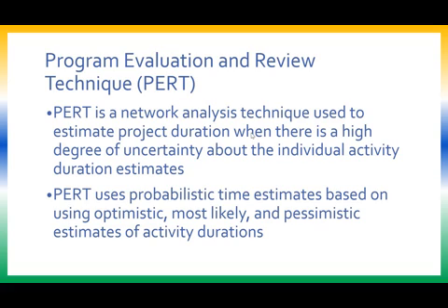See, the major difference between your CPM and PERT is CPM considers deterministic time estimates and PERT considers probabilistic time estimates. So PERT is far more realistic, far more practicable when compared to CPM. So I will tell you regarding this in detail in the course of learning PERT.